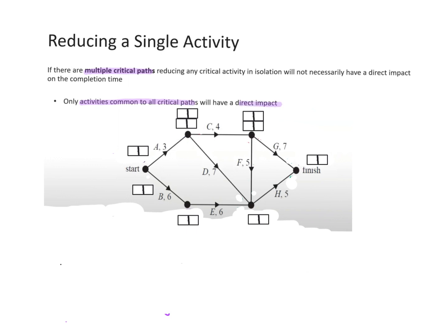So let's go find our critical path. We're going to do a forward and backward tracking. I've already put the squares in there. This is A, and this is B, and they are at the start, so they're 0. If I follow along up to the top to C, I've got 2 options after A. A leads into C and D. They both have to wait for A to finish, so that's 3.